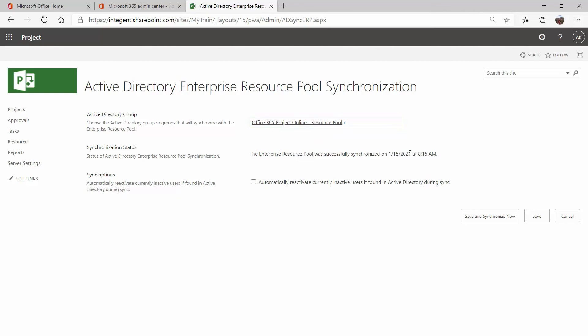So I entered in my security group that I set up at the admin portal level. And it lets me know the last status that it did successfully synchronize earlier today. And then you have the option here to automatically reactivate any inactive users if they're found. The resource pool also, if you do need to force that manual sync, it does need to be re-synced also because you could grant somebody permissions by forcing that sync, but they're not added to the resource pool until this synchronization takes place as well.